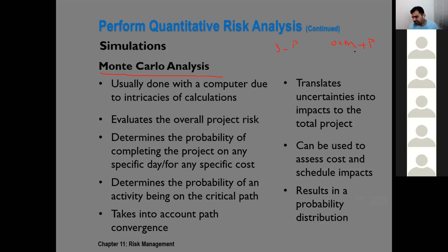Okay, it could be weighted average. It could be just standard average. Weighted average is PERT. Standard average is just our 3-point estimate. It takes data from here and determines by running computer simulations, because you cannot calculate it by hand. It's not easy. Maybe for 5 activities you might find it, but not for 5,000 activities. So computer and also MS Project, does it help to do Monte Carlo analysis, Myra?